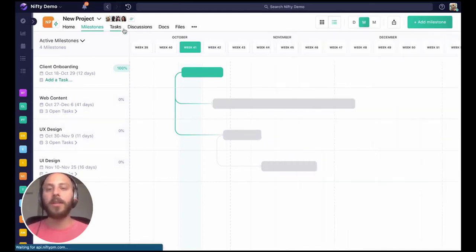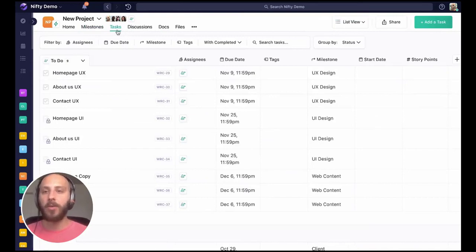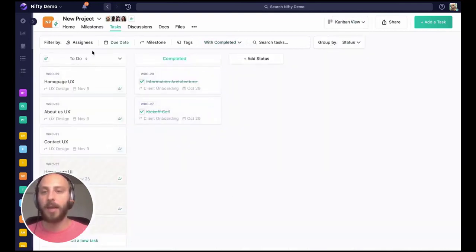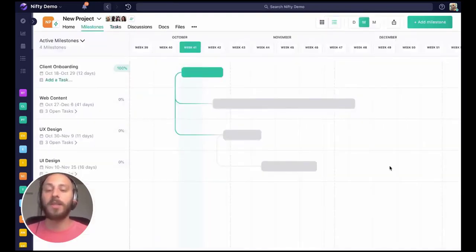It's also worth noting that all the tasks that I create are going to appear in the top list on our list view, the top status, or in the furthest left status in our Kanban board. And you can actually go ahead and tie tasks to milestones from here. You can even do so in bulk. So if you started by dropping a bunch of tasks down first, you did not do it the wrong way. So this is just one example on how to use milestones. But if you use them differently, we definitely want to learn from you. So tell us how you use milestones.